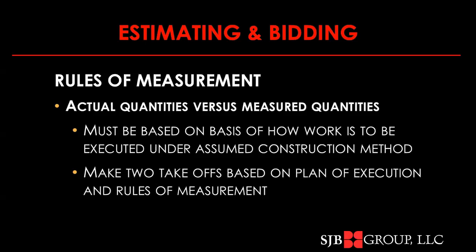So that's what we're doing, two methods of calculation. We're going to do one the way we're going to do the work, and the other translates the cost of that into the rules of how that footing is going to be measured for payment when you're prosecuting the work.